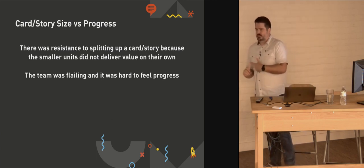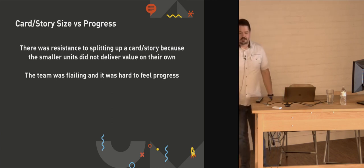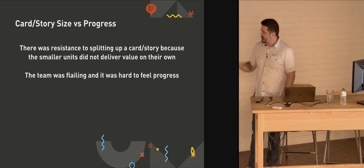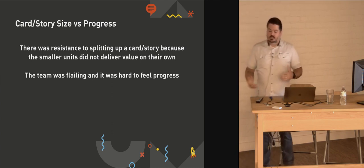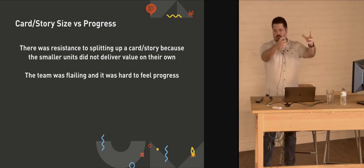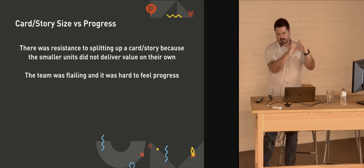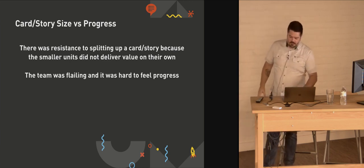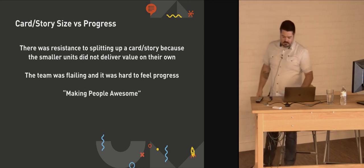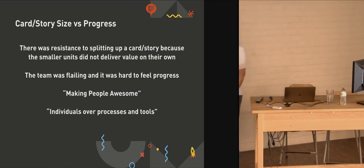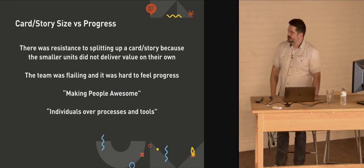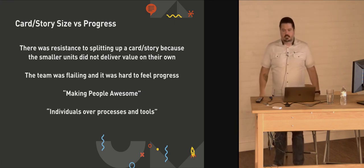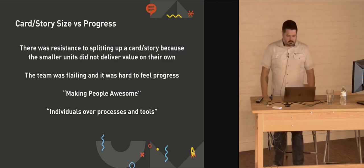And it took a couple attempts to kind of figure out what to do here. At first, we tried, okay, let's put checklists, and so we can update checklists on our JIRA tickets in this case. But in the end, we ended up just splitting everything apart and saying, okay, we need to add field validation to this field. It's one ticket. Move it across the board, and it's done. So it really, to me, this was all about let's make our team awesome, and let's listen to what our team is saying, and do the individuals over the process. And the team did feel better about this, and we got stuff done. So it was good.